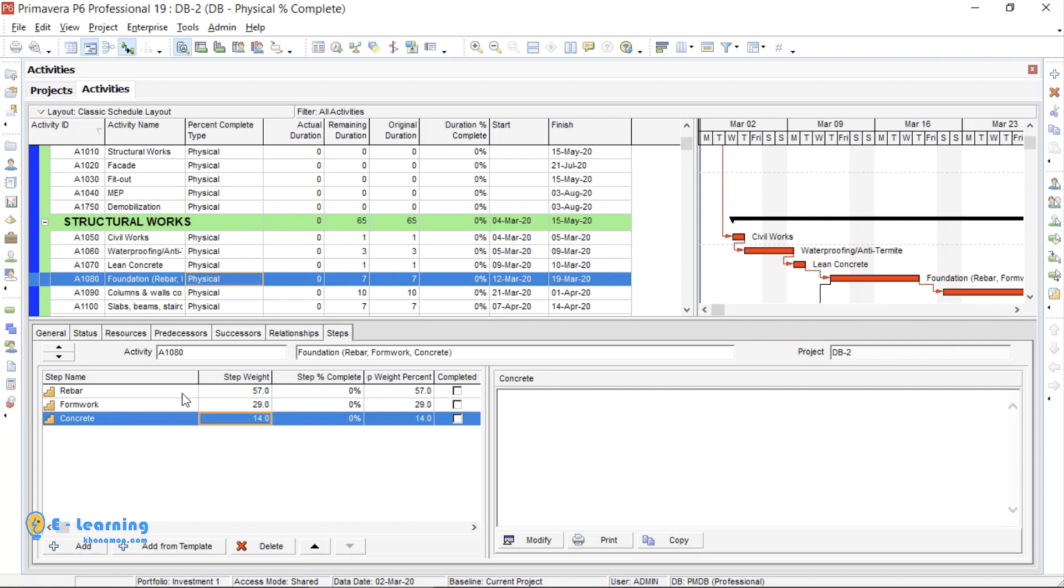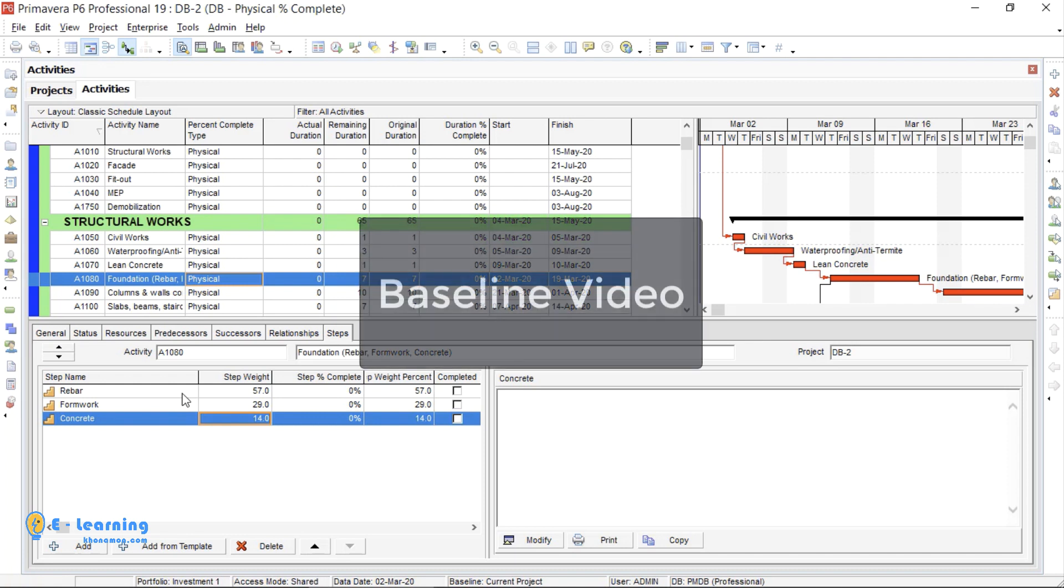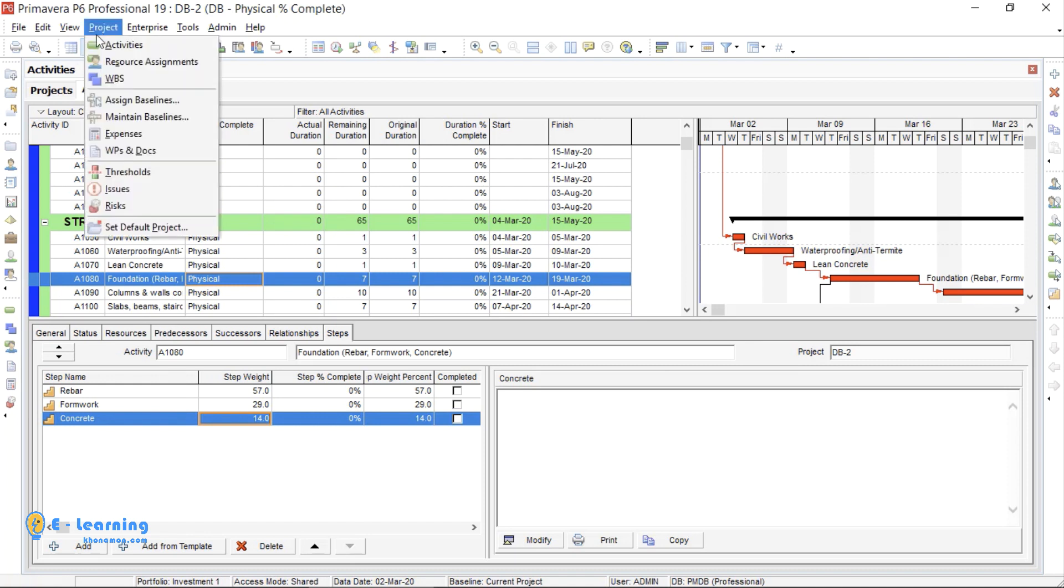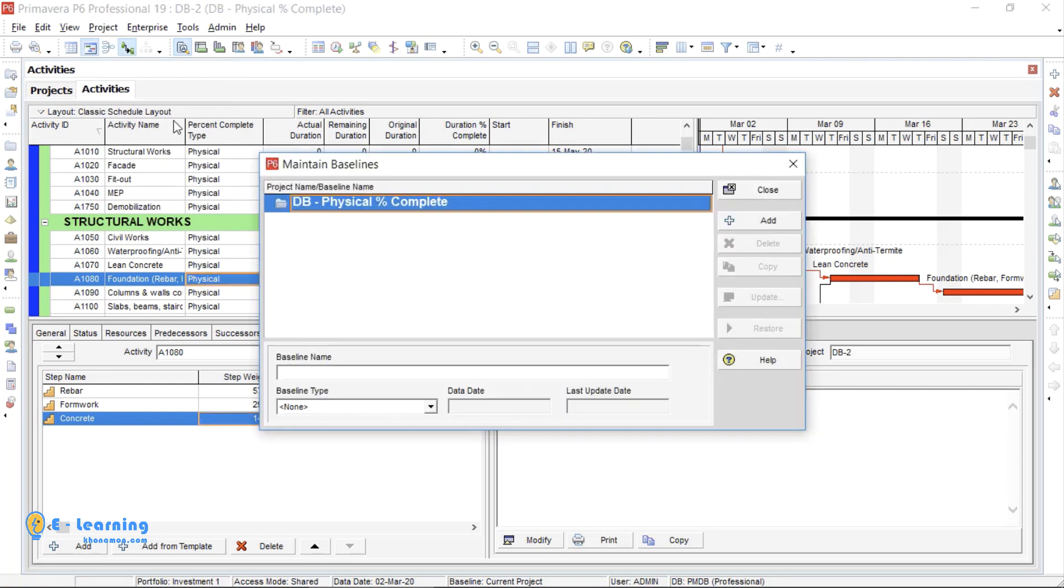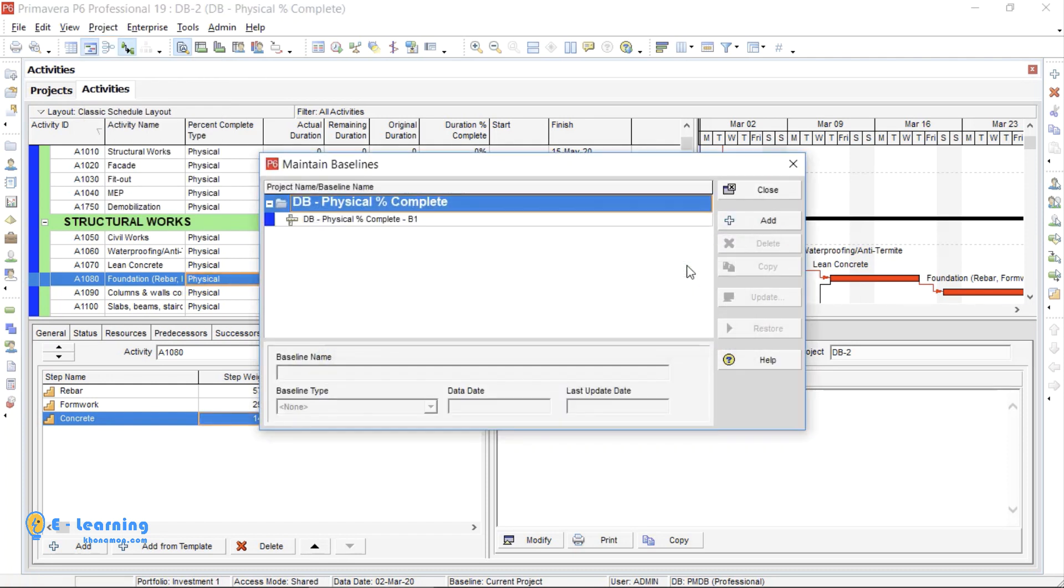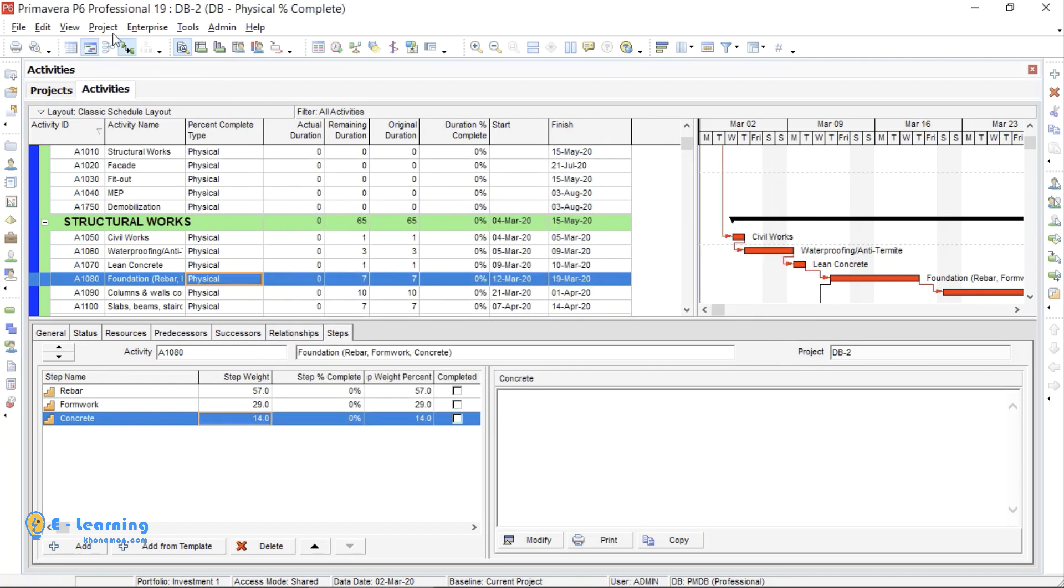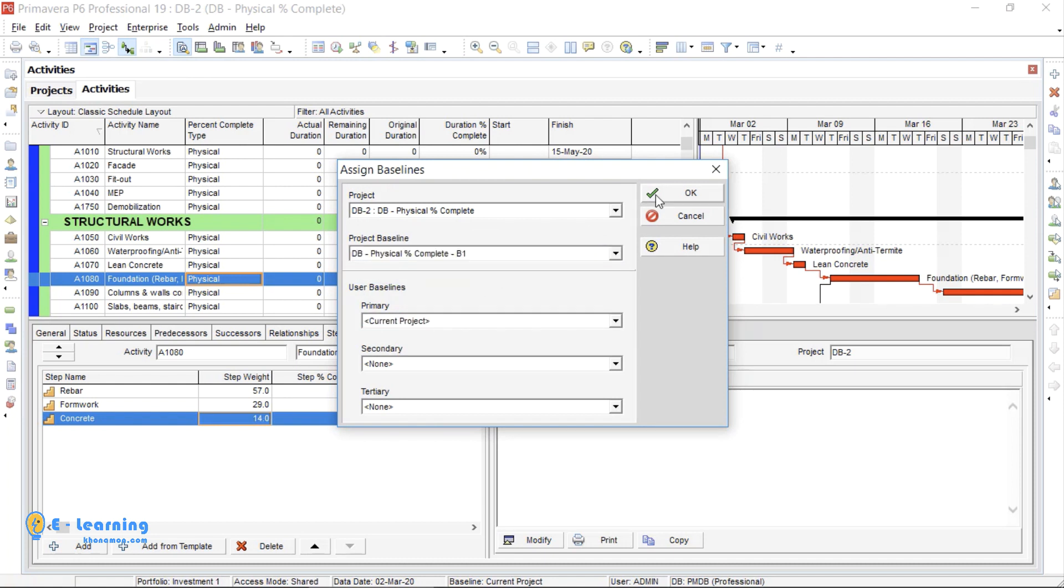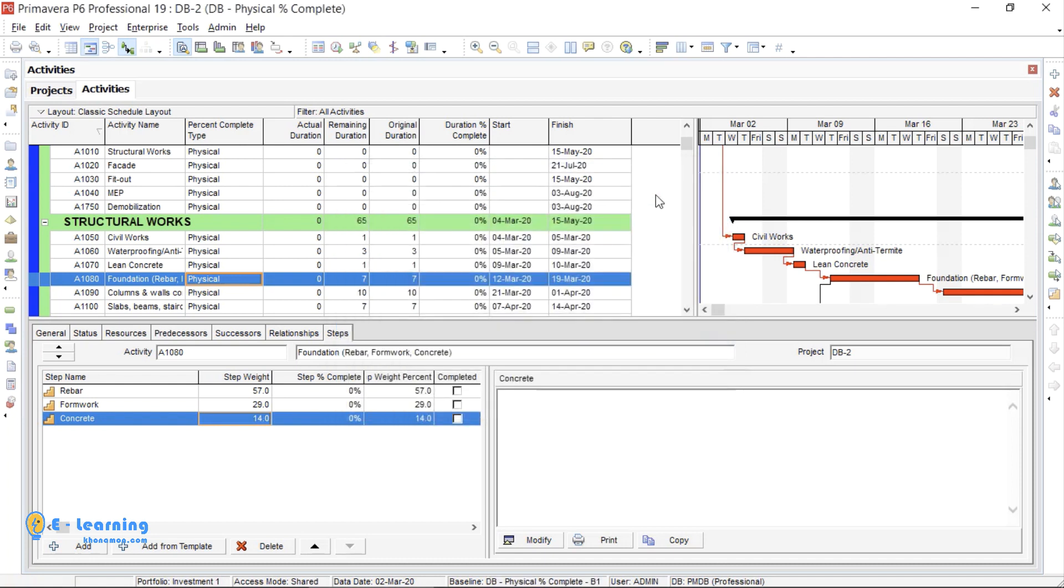Then I add all steps to all activities. I assign the baseline. I will talk about baseline after Unit Percent Complete. So, when the steps are completed, the next phase is assigning baseline. I will assign a baseline now because we will reschedule later in this video.